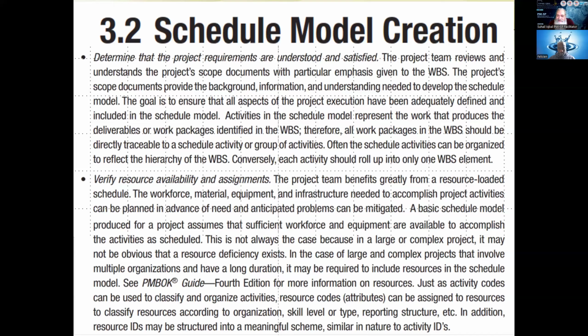The project team benefits greatly from a resource loaded schedule. The first model you create may not be resource loaded. It could be just based on time. But then you remember we did resource leveling and all that. We are trying to load the available resources onto the schedule, by which the schedule is considerably amended. That is called a resource loaded schedule, meaning the schedule model created after loading the resources.